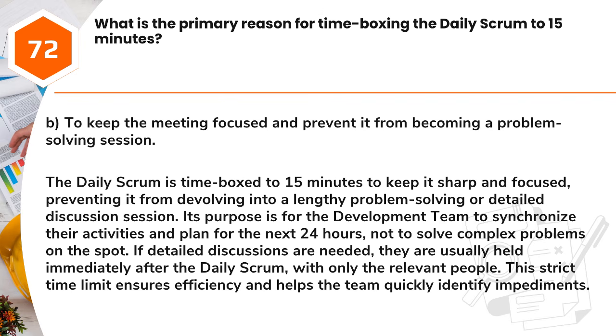Answer: B. To keep the meeting focused and prevent it from becoming a problem-solving session. The daily Scrum is timeboxed to 15 minutes to keep it sharp and focused, preventing it from devolving into a lengthy problem-solving or detailed discussion session. Its purpose is for the development team to synchronize their activities and plan for the next 24 hours, not to solve complex problems on the spot.